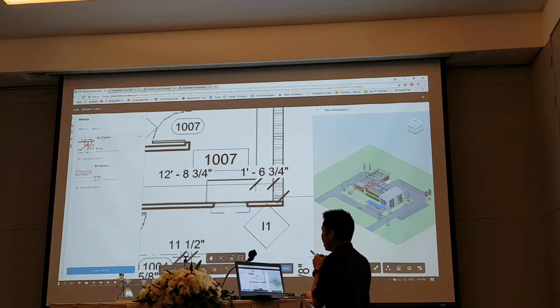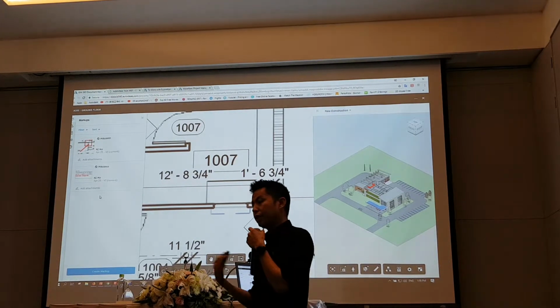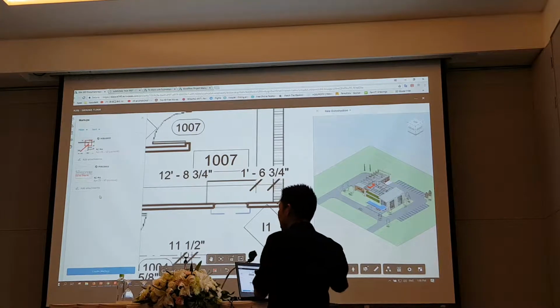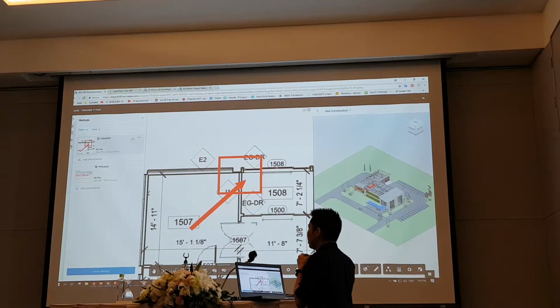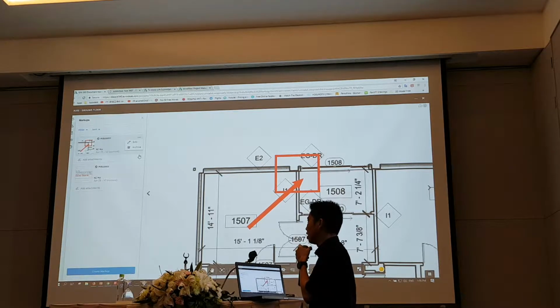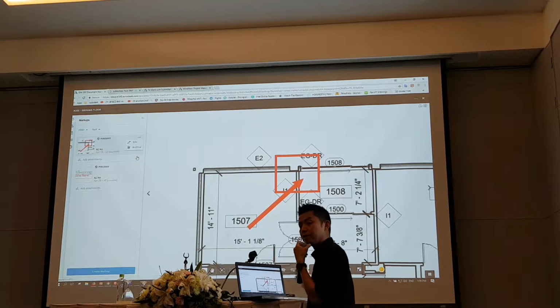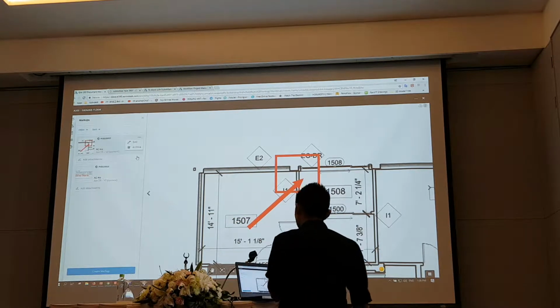Now, by the time you've done it, everything will be listed down here as markups. Let's say that you have a client. Client goes in, does the markups, comments, certain things they don't like. Everything will be kept track here. Now, what the architects need to do is go into here and say, hey, it's already done, and click on archive. It means that they already did it, they close the status and so on.